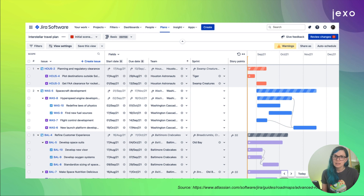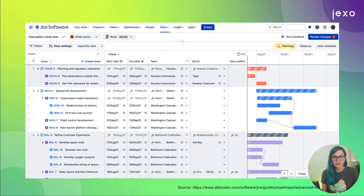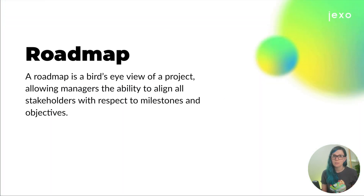With advanced roadmaps you clearly see key initiatives, scheduled tasks, and can create different versions and what-if scenarios of your project plan. Gantt charts aren't for waterfall projects only — they can be used in agile as well. However, the way Gantt charts present and track project plans easily encourages micromanagement, which can ultimately kill your autonomous teams. While using Gantt charts, we often tend to schedule from the initiative down to a single task level, which means the plan soon becomes outdated and therefore very hard to maintain.